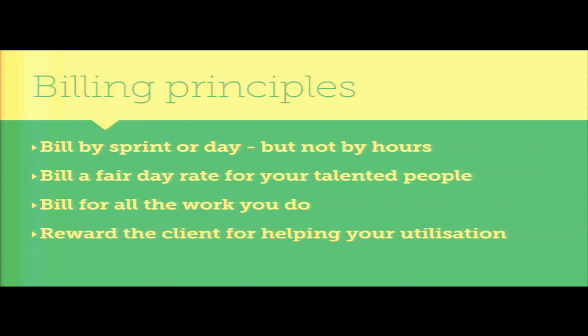And don't undervalue your talented people. We keep doing that. We keep underbilling as an industry. The one thing you can do, though, is reward good clients with discounts, because if they can help you improve your utilization, that is the percentage of potentially billable time that can actually be billed, by, say, committing to booking 10 sprints or whatever it is, then you can offer better rates. But it's a trade. It's an equal trade. If you help us improve utilization, we'll provide a discount. That's the way that discounts can work.